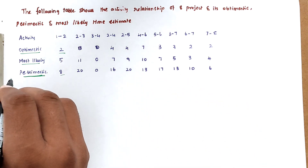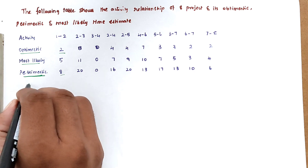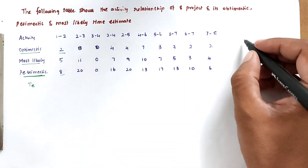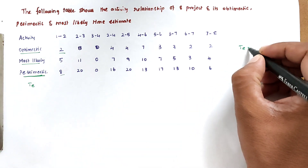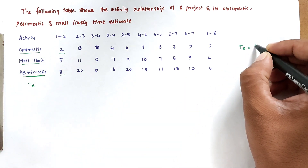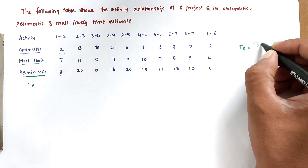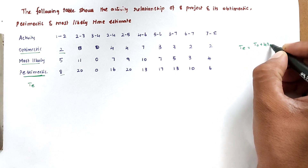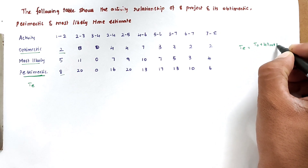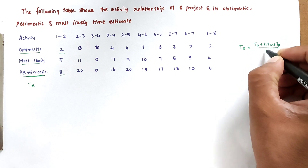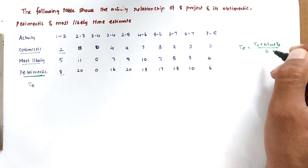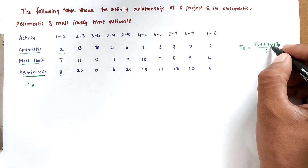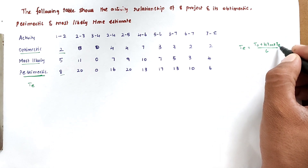Now we have to find the estimated time, TE. The formula for TE is: TE = (TO + 4·TM + TP) / 6, where TO is the optimistic time, TM is the most likely time, and TP is the pessimistic time.